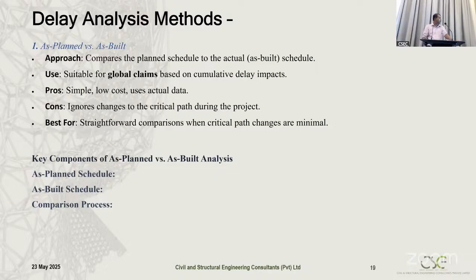And we use it for suitable global claims based on cumulative delay impacts. The advantages are simple, low cost, uses actual data. The disadvantage is it ignores changes to the critical path during the project. So when we explain, you will understand these things. And this is a straightforward comparison when critical path changes are minimal.